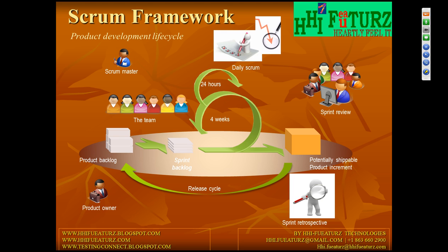So 2 years means okay. Initially, how will we come up with the sprint duration, how much will we plan? Normally for any project initially they will go for 3 weeks or 4 weeks, but mostly 4 weeks. So here let us suppose you have 100. For Gmail, those are only the features, but again sub features may come up, right? So 100 or 200, let us suppose one application has 200 backlog items. Then depending on the 200, they will plan for 1.5 years or 2 years, something like that.